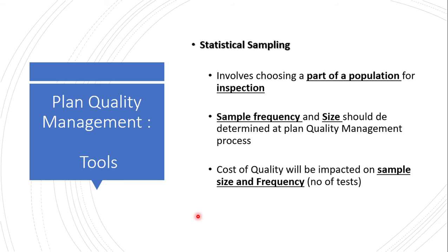Right. So some of the tools, again as I told you, is statistical sampling. You can take a coding sample without going through all the coding of all your developers. You can take a sample out of your software developers, and then start sampling out the quality.